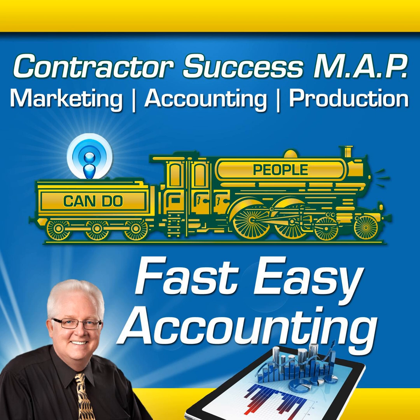When negotiating contracts with clients, try to set payment terms that help your cash flow, such as deposits or progress payments. Regular payments for contracts that take months to complete have two purposes. It gives you cash flow to match your expenses and protects you from total loss on a project if the customer goes into liquidation. Please include a timetable for the customer to pay invoices as part of any agreement. Agree on clear milestones for the work to be completed to minimize the chance of the customer disputing any invoices.